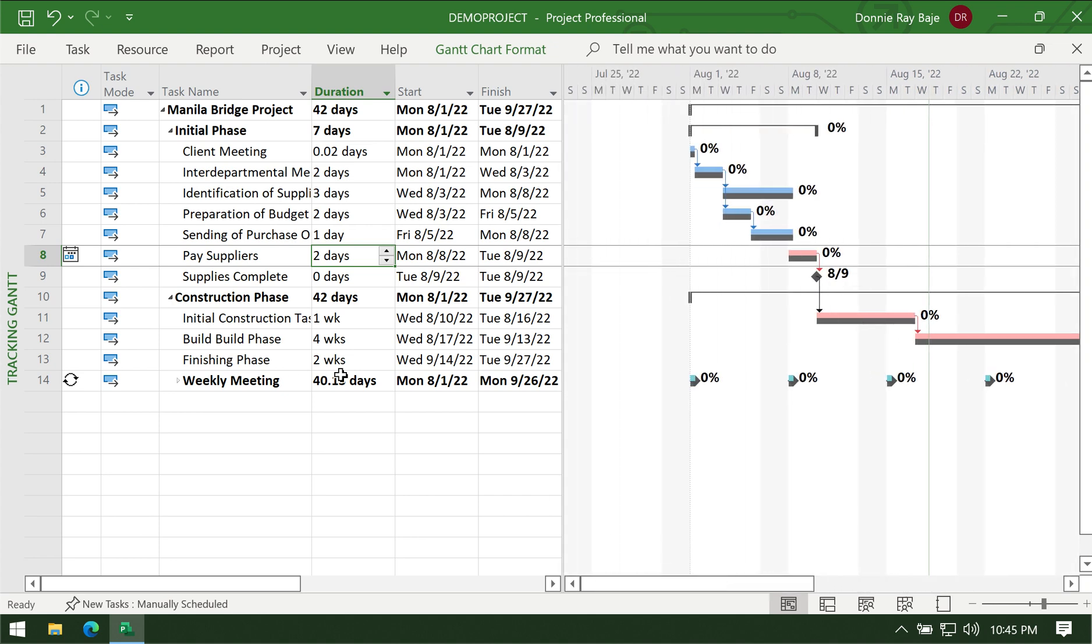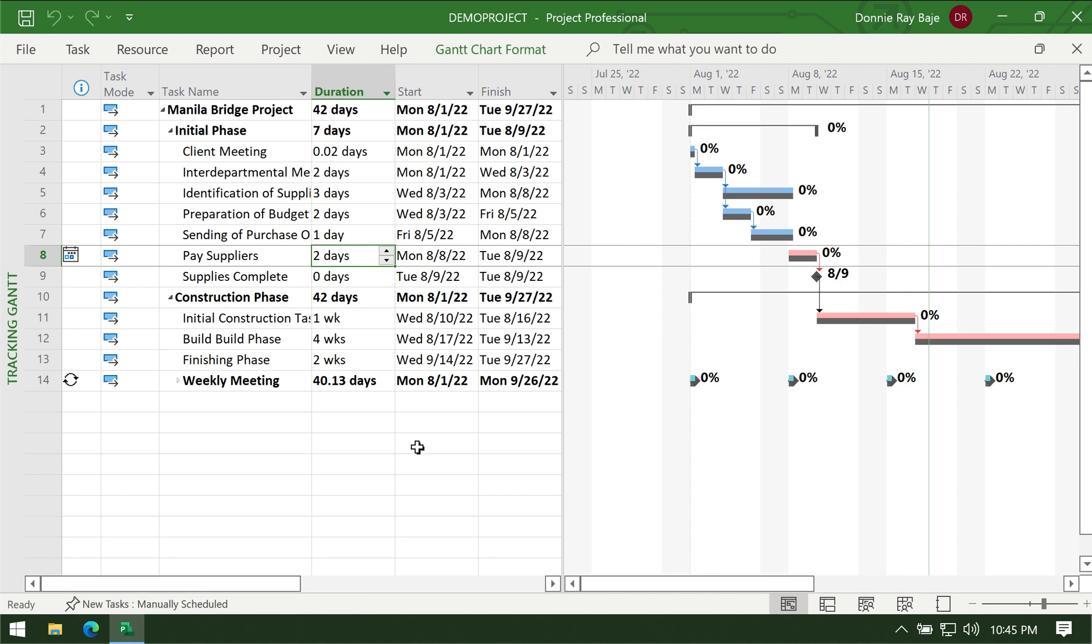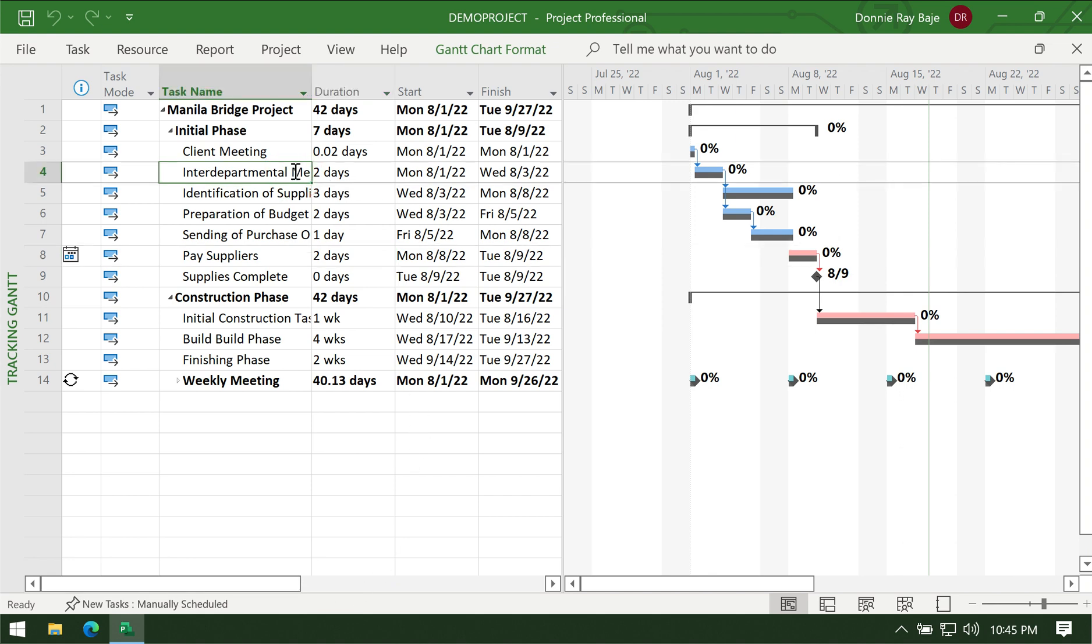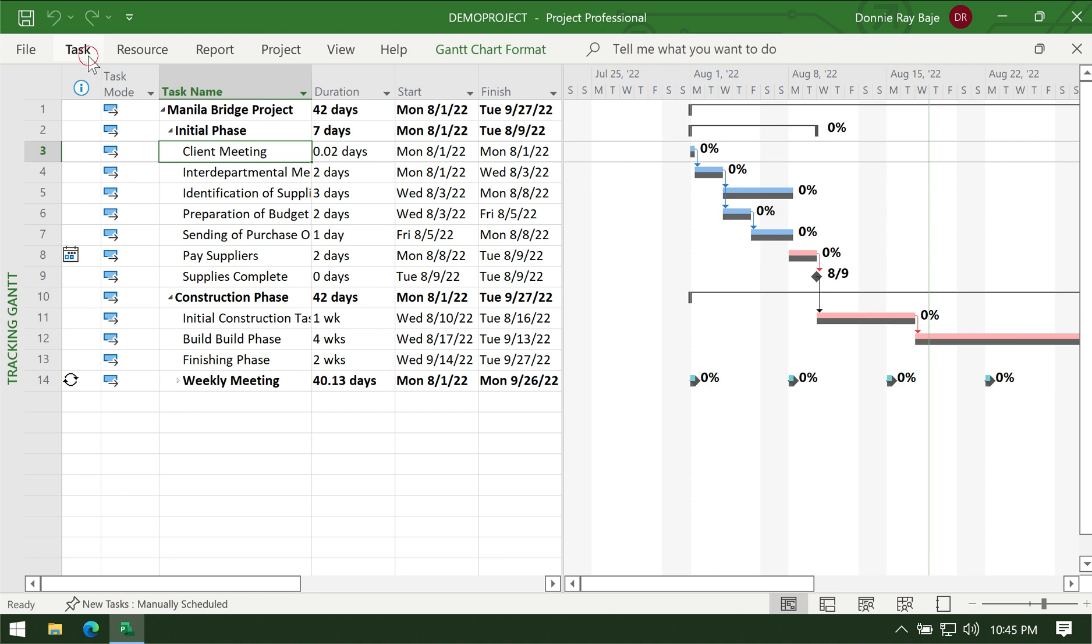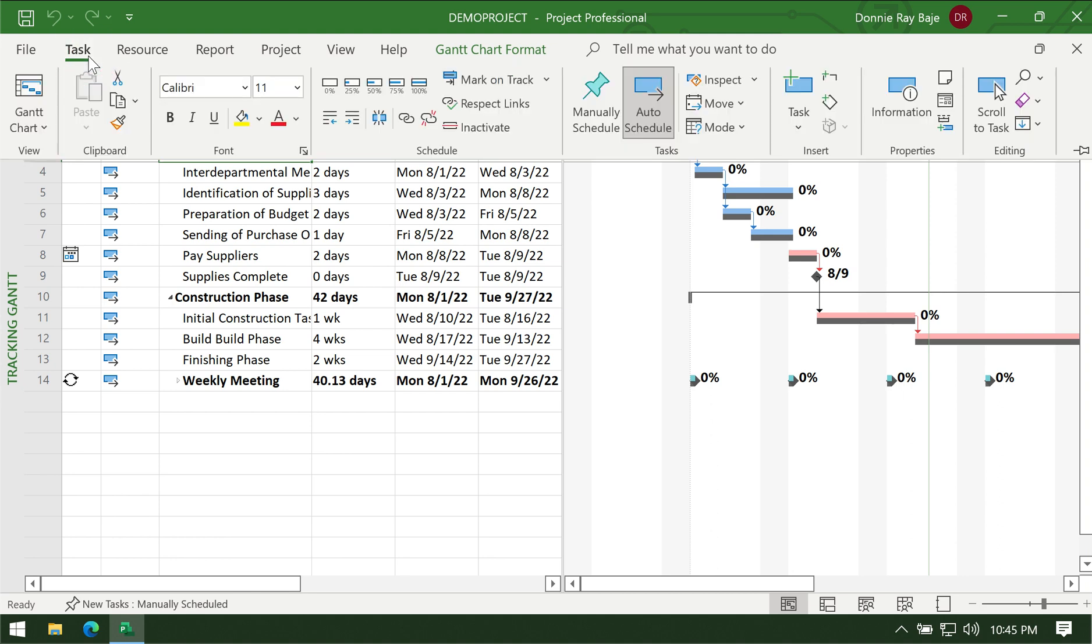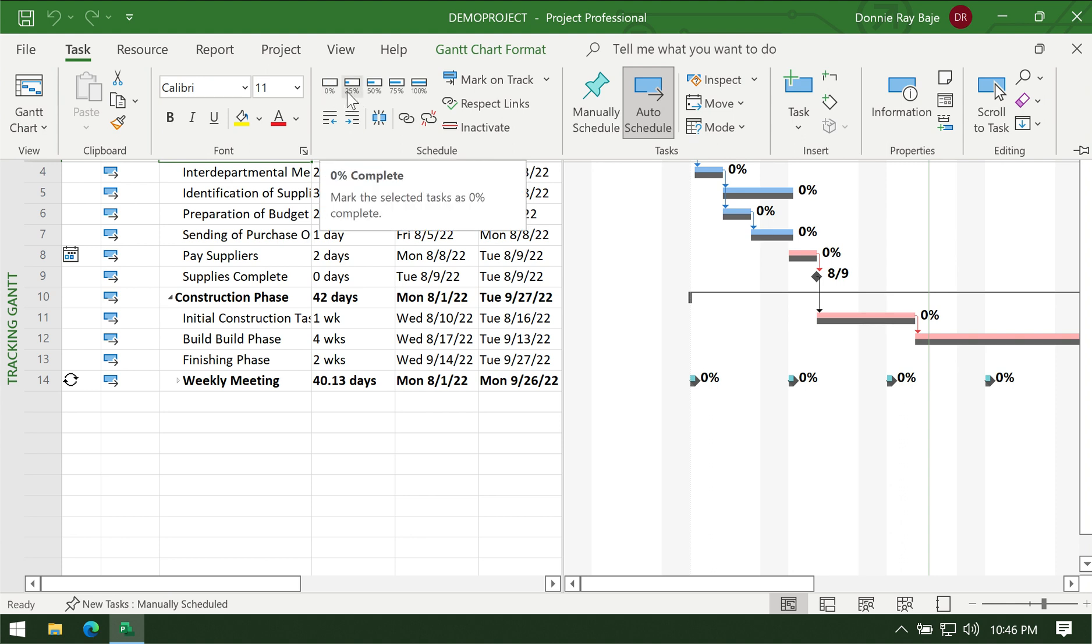And now after you've set the baseline, you're ready to modify the project as it executes. So how do you tag a project's completion rate? If you want to tag a project as completed or a certain percentage of it, then you have to go to that task and then go to the Task tab.